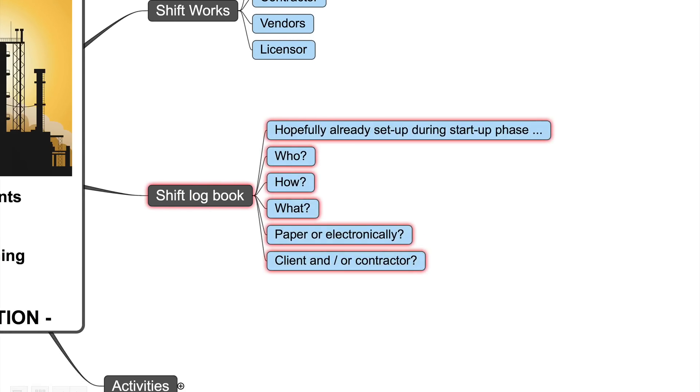We should already set up during the startup phase our shift log book. We have to know who will write in the shift log and how they have to write this, what will we write in the shift log, which things we have to document. Will we do this on paper or in an electronical form? Will we have a shift book just for the client or one for the contractor or a combined one? This should have been decided already before startup.